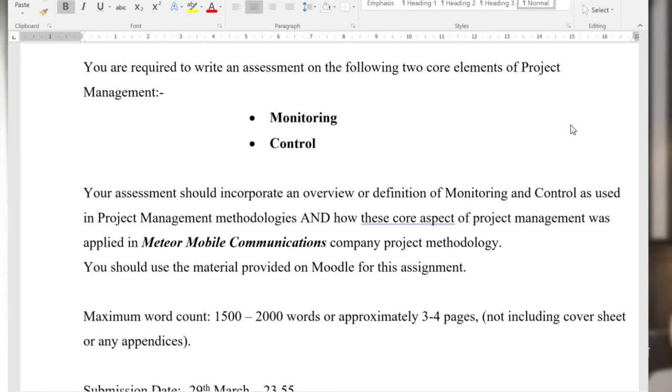Then you might have what's known as milestone 4, for argument's sake. You can have as many of these as you wish inside there, but usually they're at logical stages. So we've done the feasibility of one package or group of deliverables. Now we'll go on to the next group. When we've put them all together and we've done all the planning or all the feasibility and gathered all the requirements, we have entry and exit criteria. So we have a final meeting.